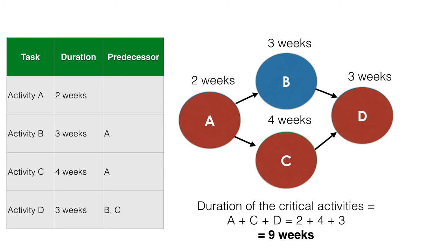Durations are given, observed, or derived from past experience and data. Durations can be constant or variable. When we wish to reduce the duration of a project, we can crash the network. This involves spending resources, usually money, to get activities done in less time.